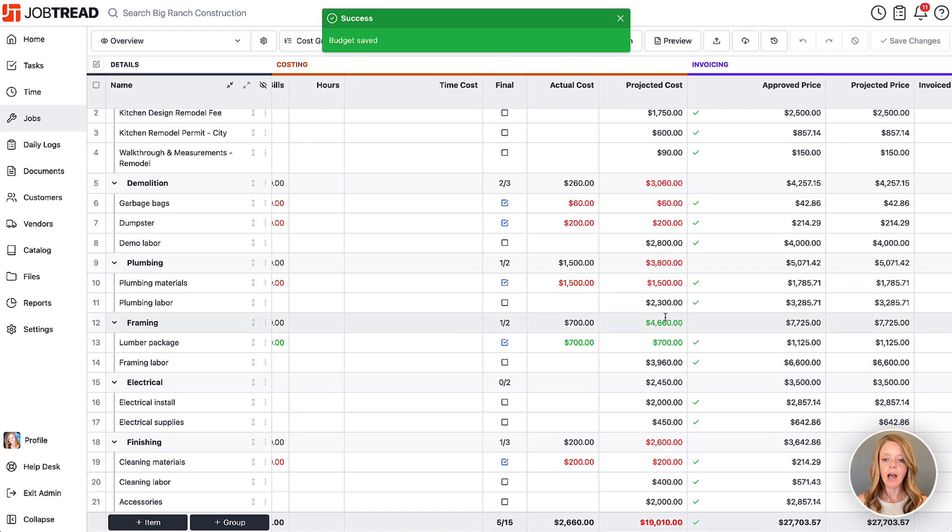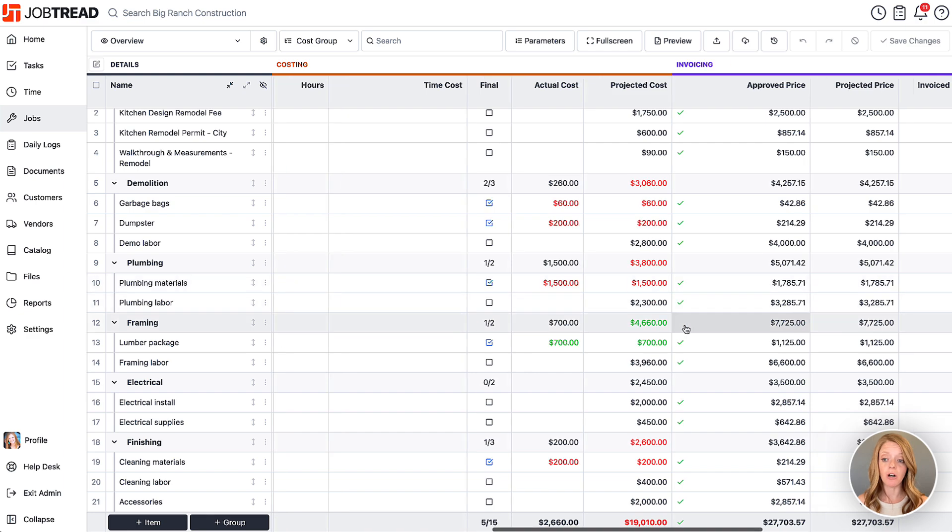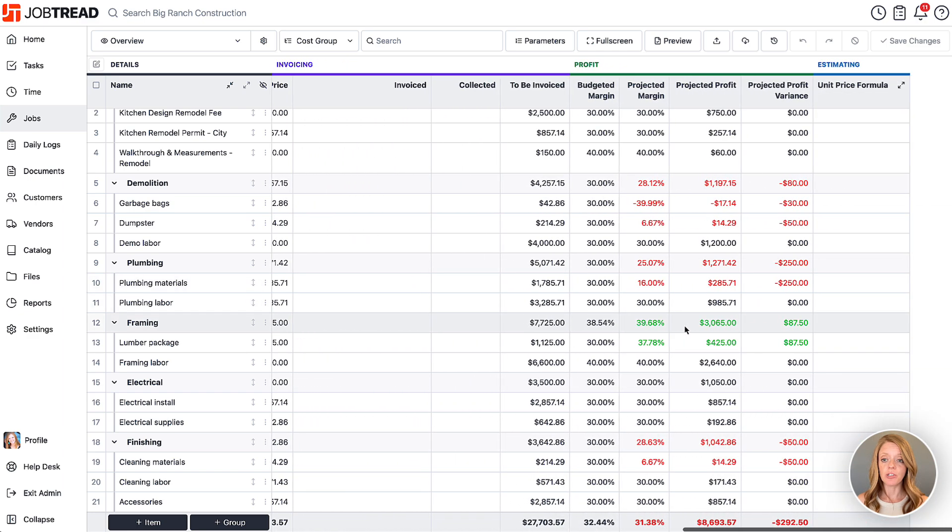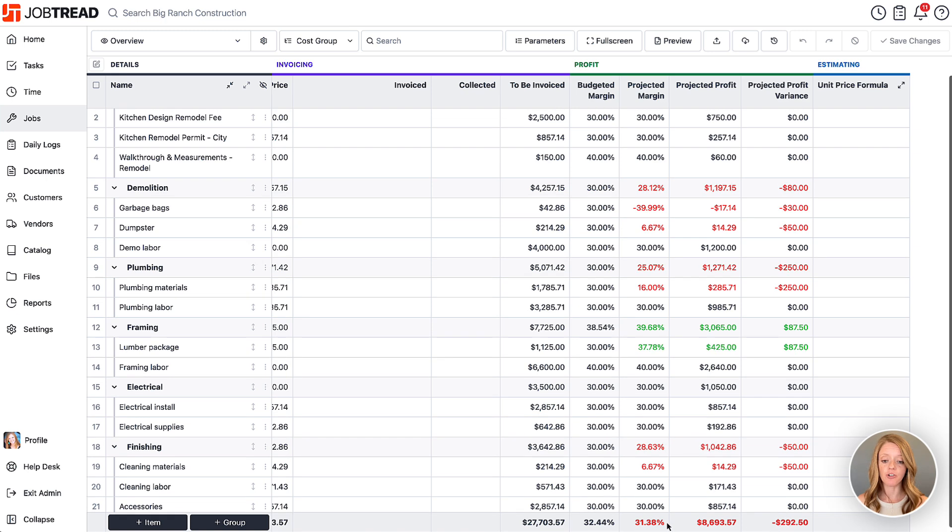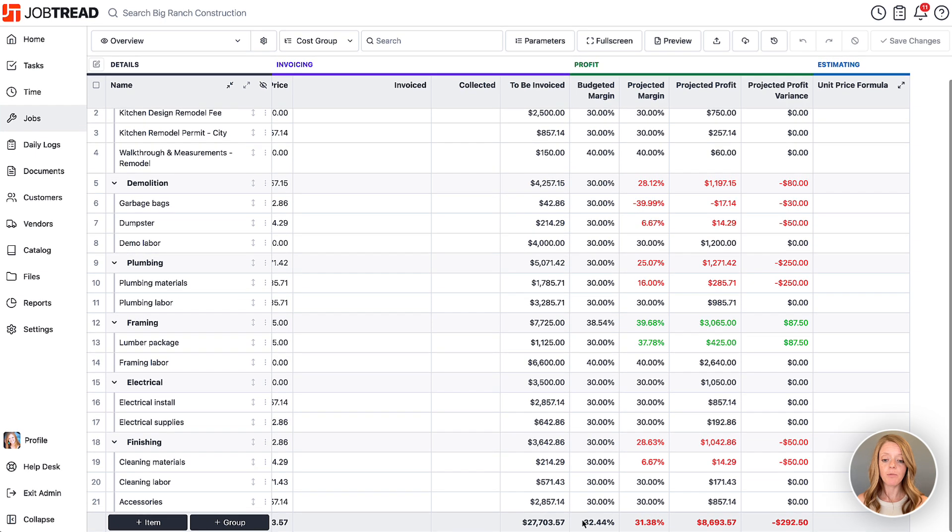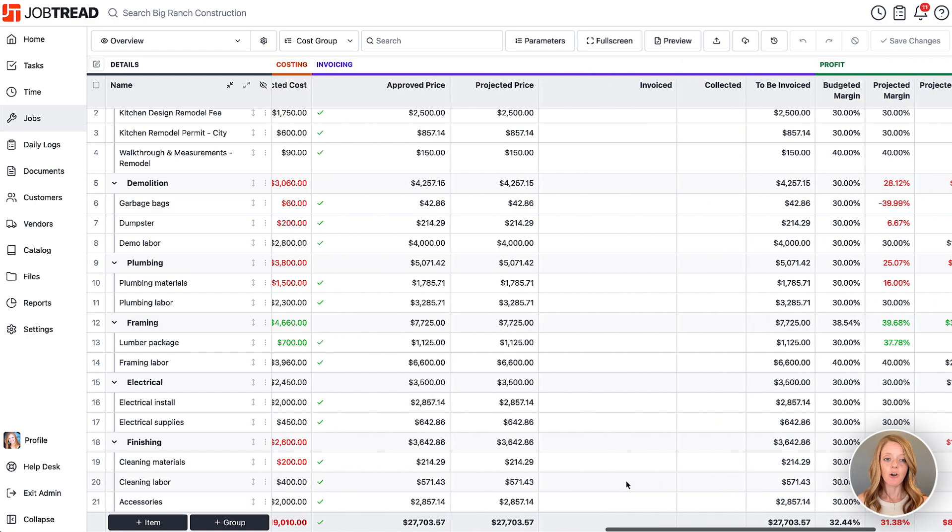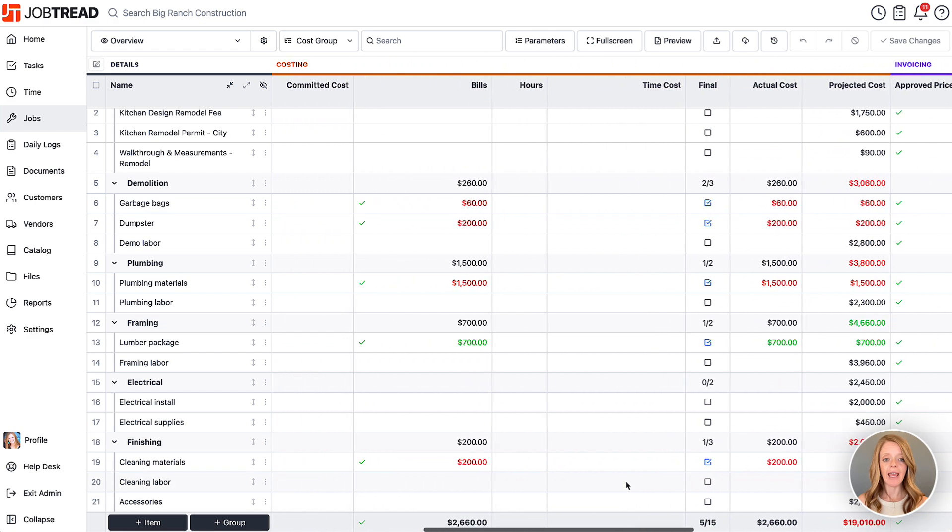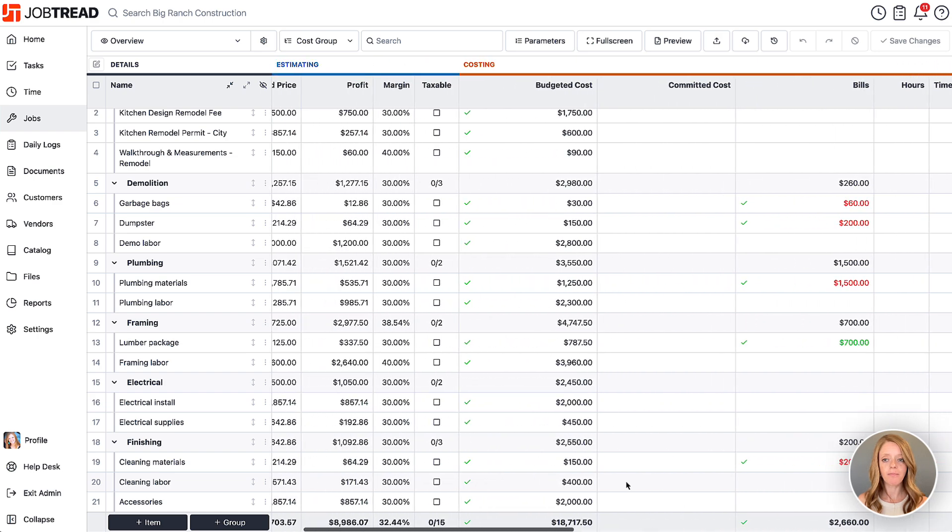Now you're going to see how they're affecting our profits - are we under budget or over budget on those lines? You'll also be able to see your projected profit variance and how your profits were affected for this job. Our intended profit was 32.44% and we're now at 31.38%. Now if I change this to a cost plus job, let's go ahead and do so.